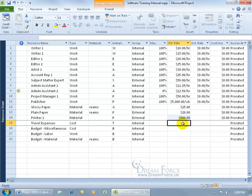In any case, the last thing that we got here is travel expenses. Now I cannot type in any numbers in the travel expenses rate field. And the reason why is because it's subjective. In other words, when I assign this to task five, to travel out of state, I can have a cost for that, and if I go to task seven and I have to travel again, that could be a different cost. So the costs are variable. What you need to do is to go ahead and assign the resource to whatever tasks that have travel expenses, and then you can actually go into that resource that's assigned to it separately for each task and assign a cost to it. Because again, one cost doesn't fit all. It could be for one task just in gas, it could be for the next task that we assign travel expenses, it could be for food only, or air flight, I mean it's a variable. In fact, let's go ahead and do that right now.